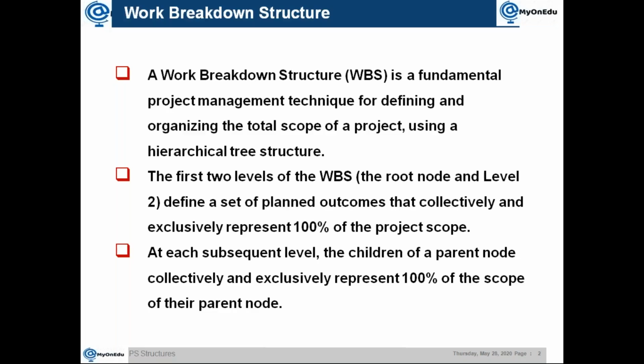Then under level 2, preparation is common across modules. When it comes to blueprint, yes, you can break it down further, because you will have a blueprint for FICO, blueprint for MM, blueprint for SD, blueprint for PP, etc. Similarly, if you go to realization, you can have it in a similar way. So that is what it is saying: you need to have a hierarchical tree structure.